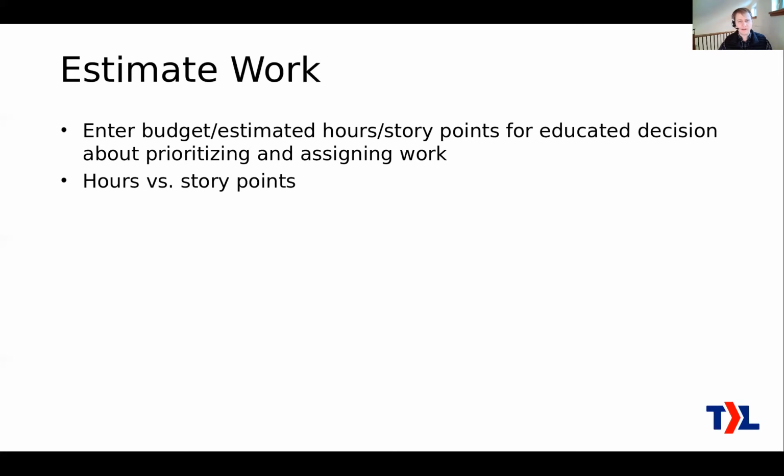The benefit of that is that with hours, it depends on the experience and knowledge level of the person who's actually doing it. That will change the number of hours that it takes. Your junior engineer is not going to do something as fast as a senior engineer. Story points have the benefit that it doesn't really matter who actually does the work. Everybody should be able to estimate and say, hey, this particular ticket is about the same complexity as these other ones, and these other ones had a rating of 5 story points, for example. So we'll rate it as a 5. It doesn't matter who's actually going to do that work.